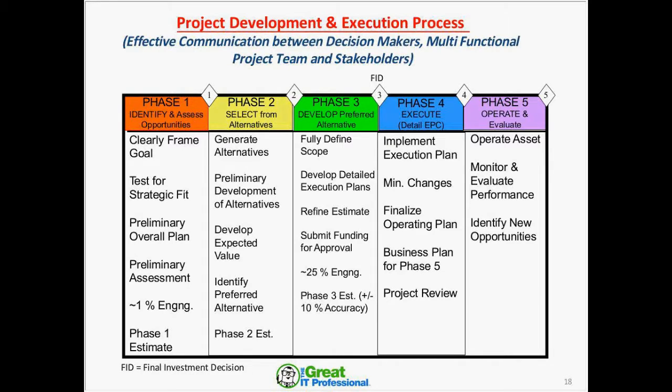And so when you go to the phase 3 Diamond, which is the final investment decision, this is where you're really making the commitment for the big money. Again, phases 1, 2, and 3 are known as front-end loading or planning phases, and then phase 4 is the execution phase. This is where we'll do detailed engineering, procurement, construction, etc. for our type of projects.